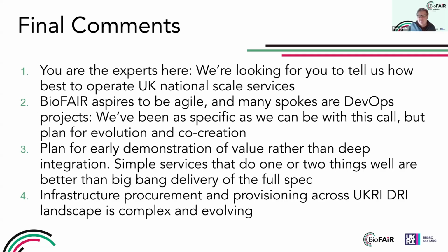So simple services that do one or two things well are better than a big bang delivery of the full spec that's going to take a long time to deliver. Showing some value and building engagement, even if it's very manual, is really good. We have some of the manual structures in place to support some of that. We can work with Pathfinder projects, we can work with fellows to put these things together. So giving them one or two services that optimize a narrow part of that whole research data management journey is very valuable.